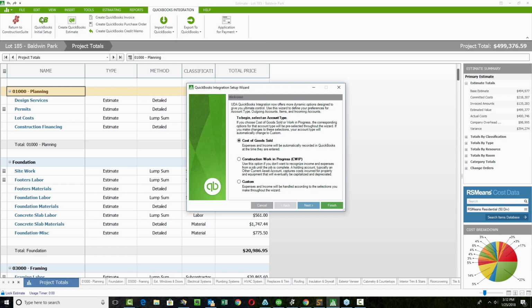We'll have nails, we'll have paint, we'll have all these different things. They tend to be very, very specific, and sometimes they can be pretty small pieces that we're estimating in here. As some of the major construction accountants will tell you, though, you'll end up spending way more time trying to track the pennies that you spend on a box of nails, and it becomes much, much more valuable to summarize that information so that you can focus more on figuring out the top-level expenditures or your top-level job costing, and only worry about how much you spent on a box of nails if it becomes too expensive.